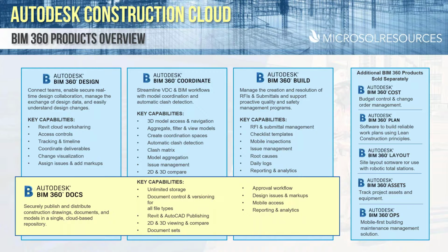And then finally, there's Assemble, which isn't listed on this slide, but it's an integration with BIM 360, which allows for taking the models, files, and information housed in BIM 360 and quickly sorting, grouping, and filtering the quantities associated with the metadata in your Revit model, to help in both pre-construction and construction management for things like bid management or estimating, takeoffs, value engineering, and various other project tracking tasks.